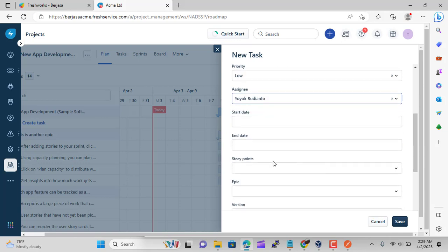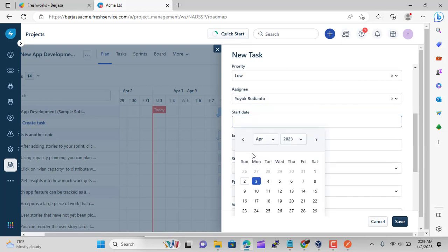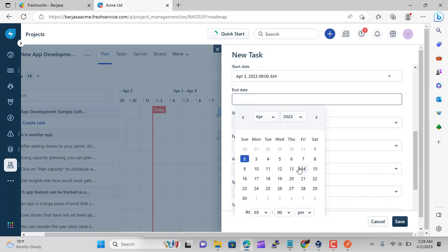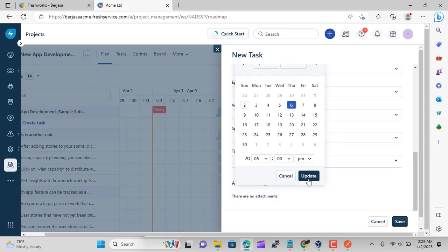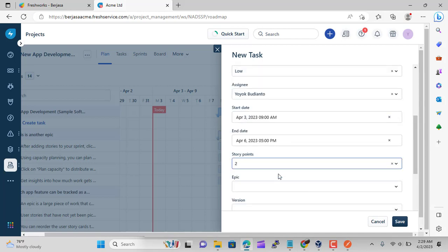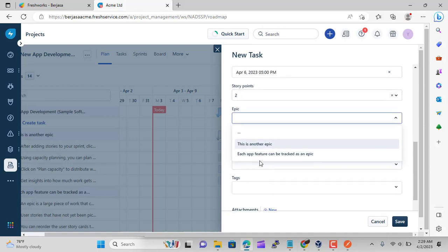If the current date has passed the planned end date, i.e. the intended completion date, but the status of the item is still open or in progress, it is considered to be delayed and is indicated with red color. The workload card of each person gives the count of planned, unplanned, and delayed work. Upcoming feature.